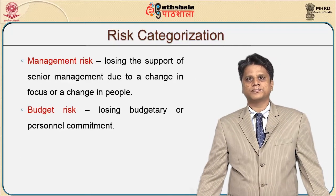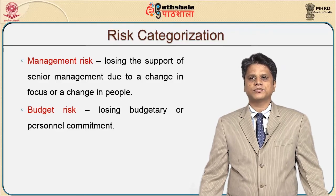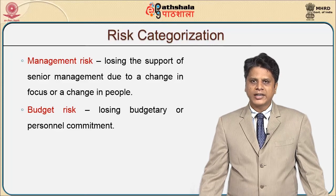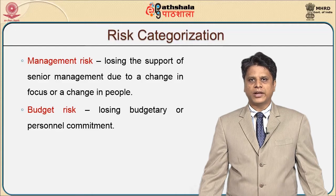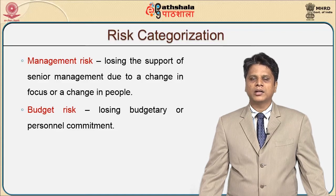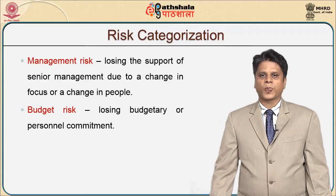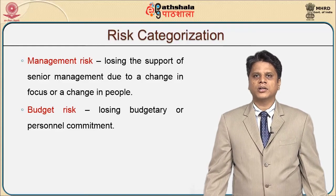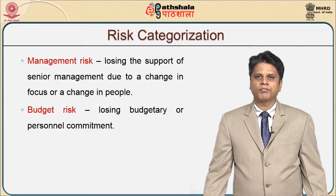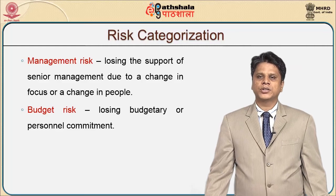The other category is management risk, where we lose the support of senior management due to change in focus or change in people. We start with the project with the understanding that if everything goes fine — resources, manpower, management, and other involved activities — the project can be delivered with quality and within the time frame. If we do not get proper support from senior management because of some change of people, then this suffers management risk. There are also budgetary conditions — we might lose budget and personal commitment, which is called budget risk.